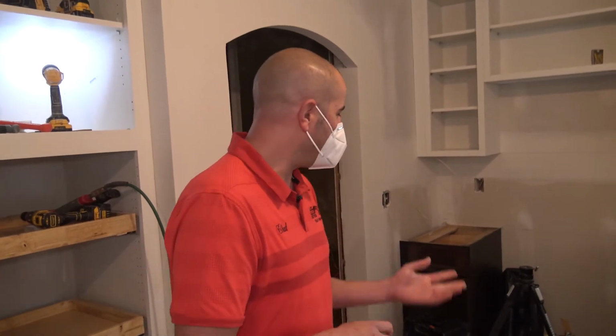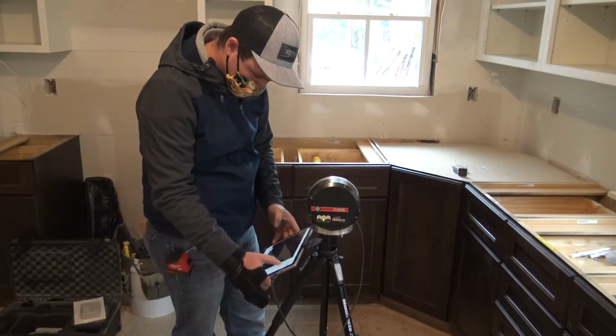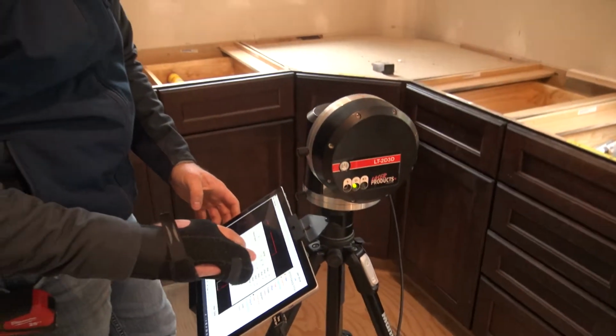Well, Patrick, we're excited to be involved in the process. As you can see, we do have kitchen cabinet boxes up. We're actually getting ready to do countertop template. Countertop template's an important step to make sure you get done early in the process. It allows for proper integrations of steps following. Anytime you're doing a kitchen remodel, you want to make sure that you rush to get to the point of countertop template. That way you can do all the ancillary things like ground molding.